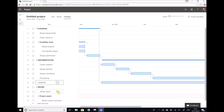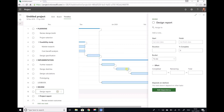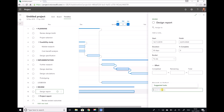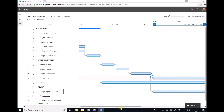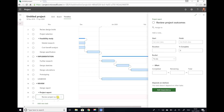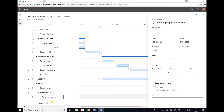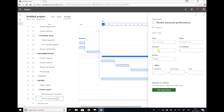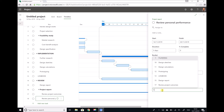Our last couple of sections: we have the design report which runs alongside prototyping, so it has the same duration as prototyping — 50 days — and starts immediately after design calculations, which precede prototyping. Once again we see our Gantt chart update accordingly. Finally there are two subtasks within our project report. We have review project outcomes lasting five days, starting after the completion of prototyping, task 12. And finally we have review personal performance lasting five days, starting immediately after review project outcomes, task 17.